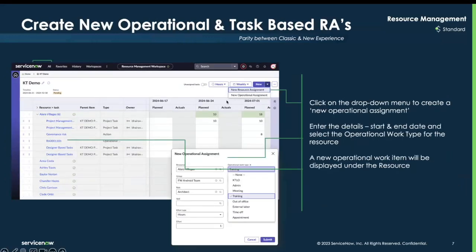One of the new updates is that users can now create new operational and task-based assignments directly from the drop-down menu under New. After entering the start and end dates of the type of work, the new assignment will then appear under that designated resource.